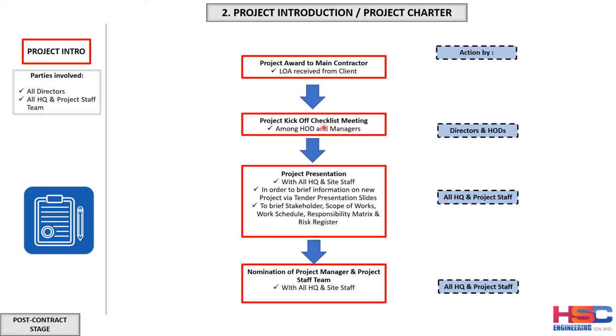From there, the main contractor will have a project kickoff checklist meeting. We will go into detail on what items are discussed in this project kickoff checklist meeting. However, here we want to inform that this checklist meeting will be attended by the heads of department and the managers, including the project manager. So all the directors and heads of department will meet to discuss the kick-off checklist items. And after that, there will be a project presentation.